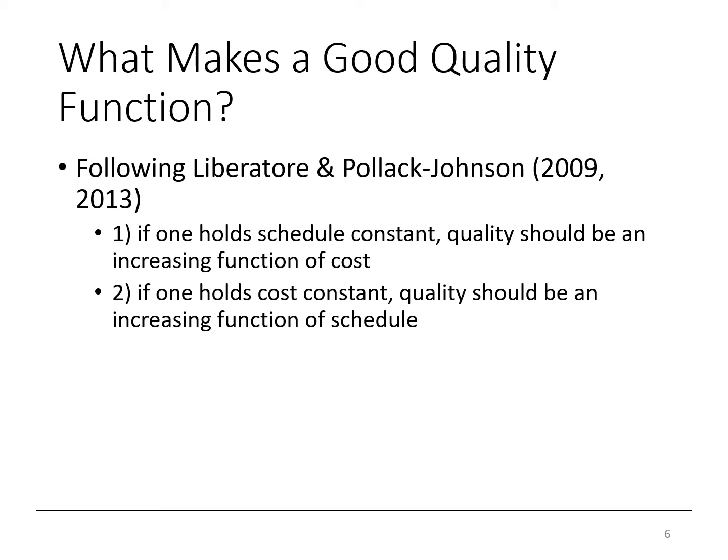So if we're to define a quality function, there must be some criteria to define what makes a good quality function versus a bad one. Liberatore and Pollack-Johnson defined two criteria that make up a good quality function. One, if one holds schedule constant, then quality should be an increasing function of cost. And two, if one holds cost constant, then quality should be an increasing function of schedule. In other words, as we spend more time and money on an activity, quality should increase.